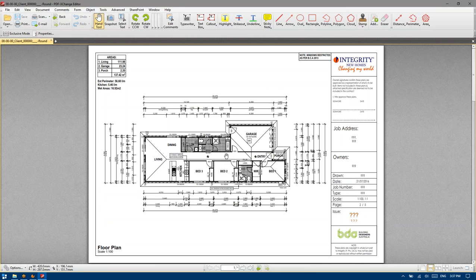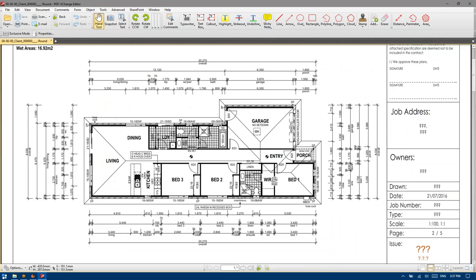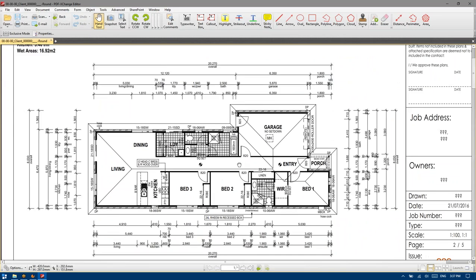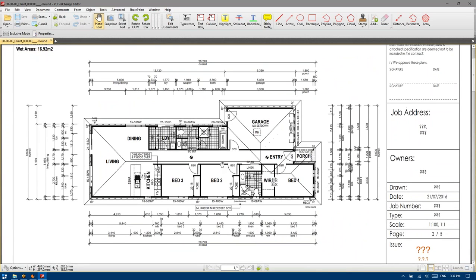While there may be a nominal detail from an architect's perspective, having a vanity shown on your plans with a basin step sitting forward is a potential liability for yourself pricing that as a standard because it's unlikely you're going to be able to purchase that product cost effectively. You'll be bound to provide a cabinet-made vanity unless you've noted otherwise or priced that in.